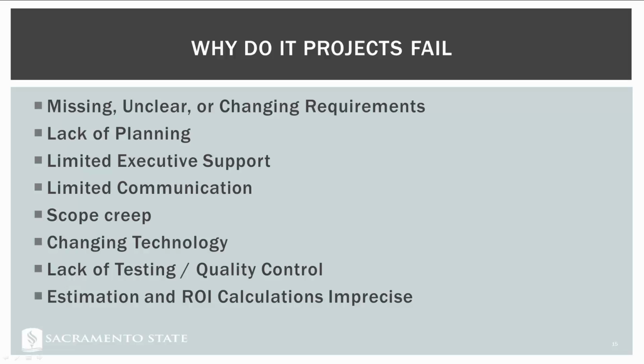What does the project need to accomplish? What do we need to do in order to make those goals happen? And strangely enough, oftentimes that's missing from IT project management, from the systems development perspective. We don't do that as well as we should. We start projects because we think that they're cool, or somebody decides, hey, I need a project. We need to get with the times. Let's make an app, but nobody defines what should be in the app. All right, and so this is one of the reasons why projects fail: the requirements just aren't there.